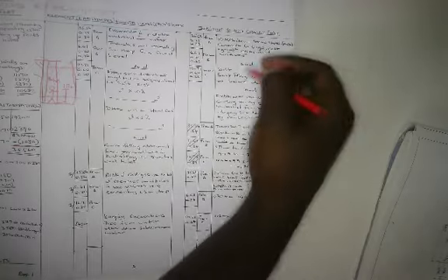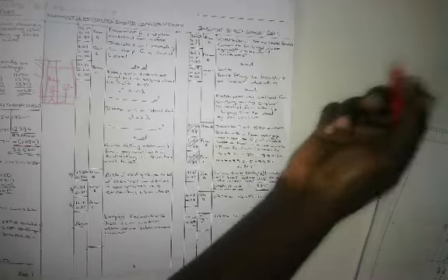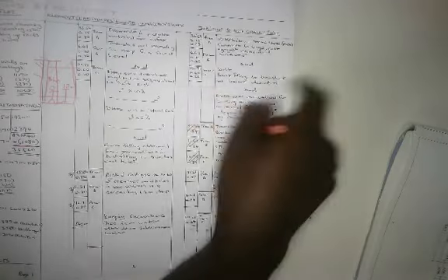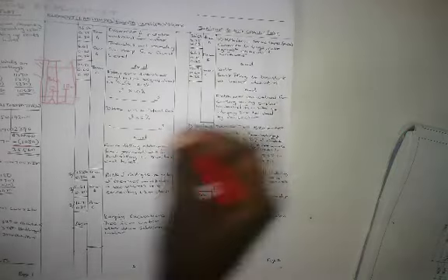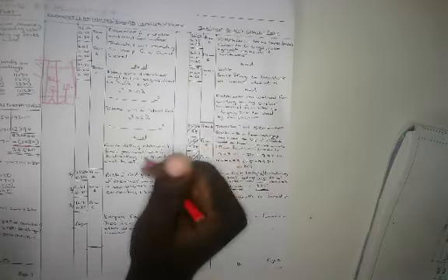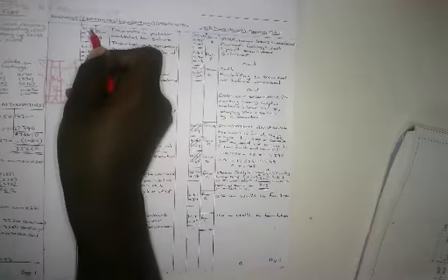Now, the reason we do a backfill whilst we're also doing an excavation for the same dimensions is going to be clear when we get to measuring our concrete and measuring our brickwork. You will see that we know that we have dug the excavation and put the filling back, but we are going to remove it back as we go on with our measurements.